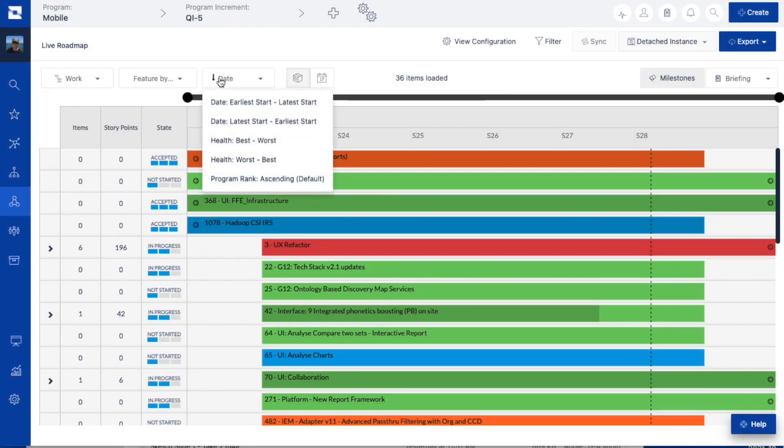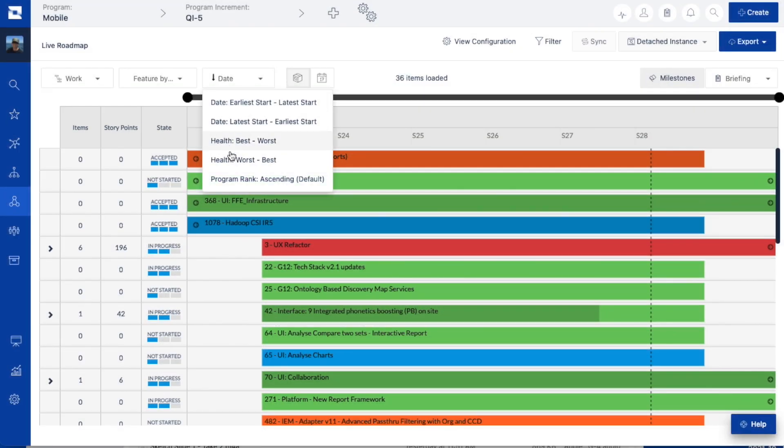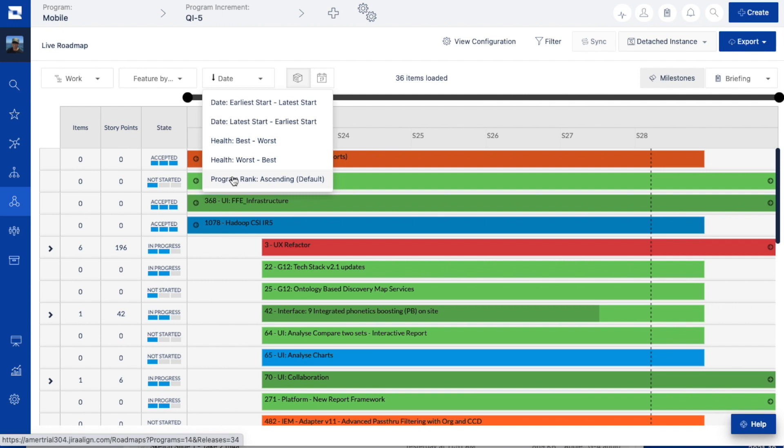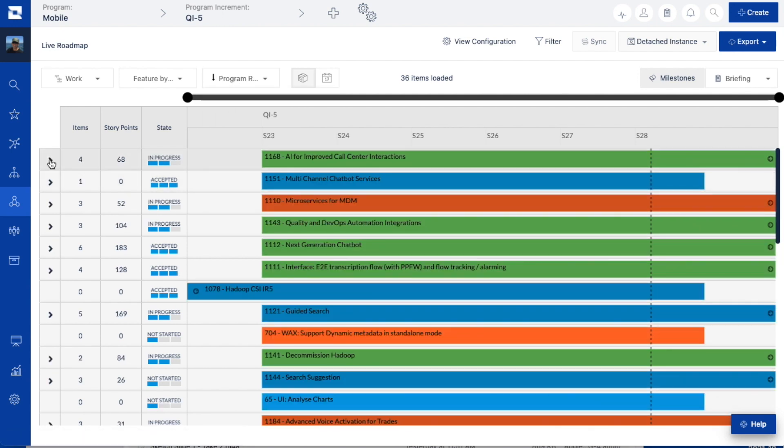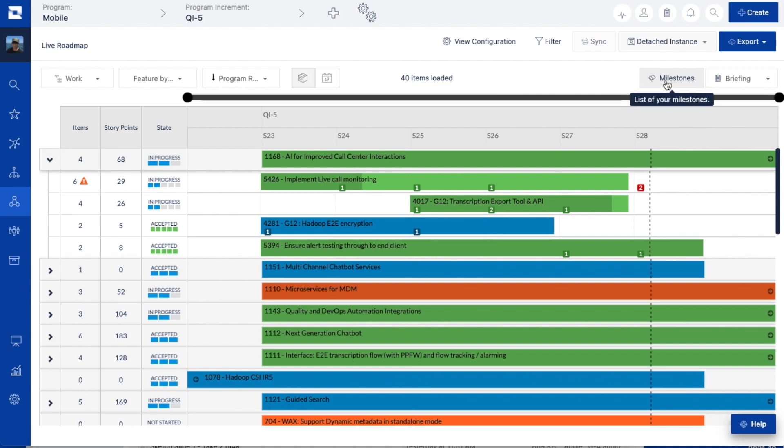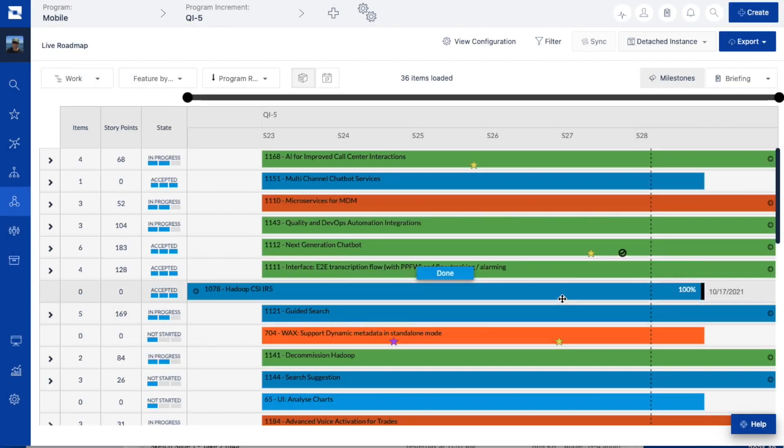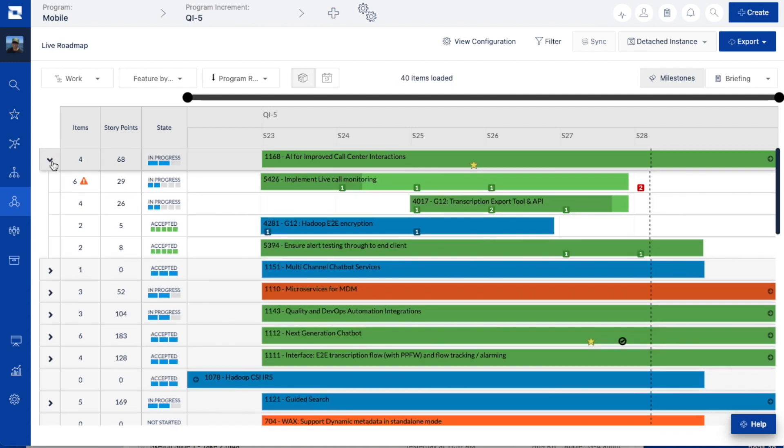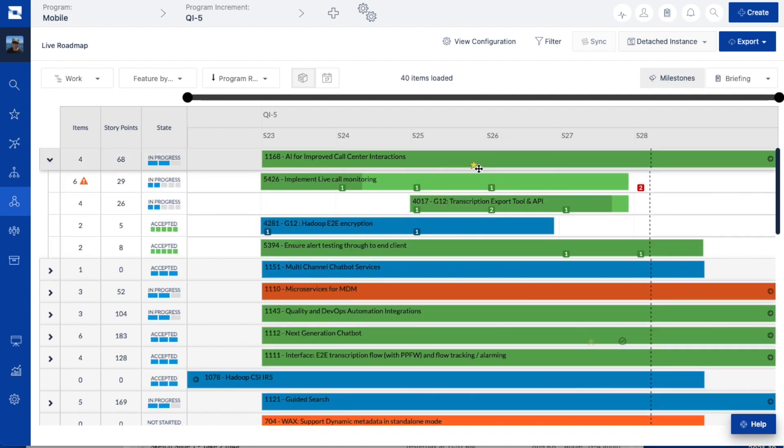Finally, you can validate your backlog priority against the execution of work using the roadmap. Within the Jira Align roadmap, you can sort work items by the backlog priority rank, which allows you to verify that the priority of work aligns with the current execution plans and any fixed date milestones.